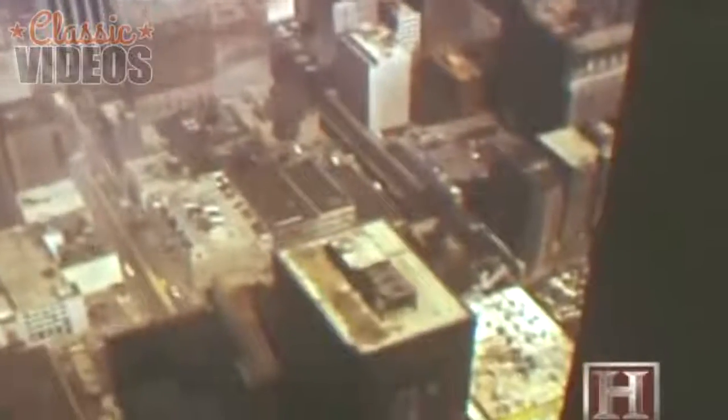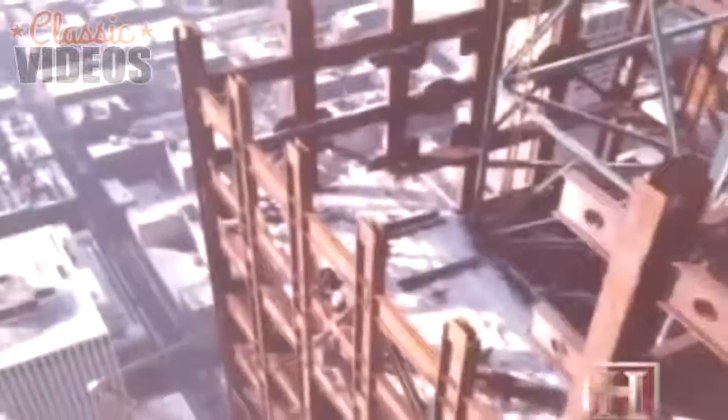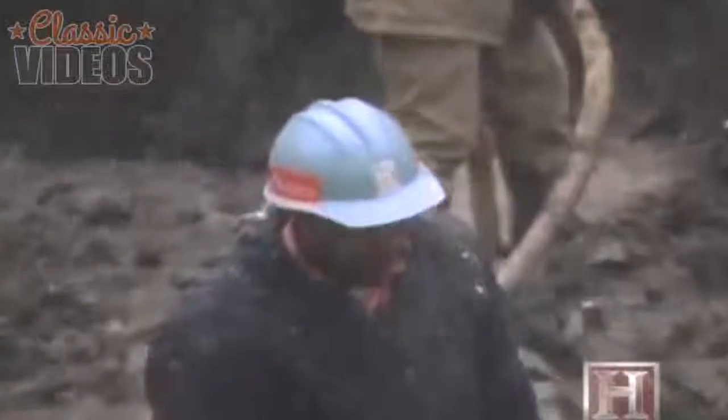As the building climbed, the workers found themselves fighting the forces of Mother Nature in their struggle to claim their share of the sky. They found that the weather at the top of the building could be drastically different from that on the ground. In the morning, the ironworker steward would go up early and check the weather on top to see if it was fit to work. And sometimes it would be nice down below and the sun shining and not a lot of wind, and the steward would come down and say, "No work today, boys. The wind is blowing too strong up there," or it's maybe 20 degrees colder and it was actually too cold to work. Dozens of workdays were lost due to wind, snow, or temperatures below 10 degrees. From August to December 1972, ironworkers were unable to work a complete week.